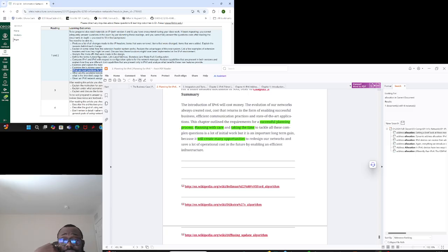Once you've done that, the next thing is that you have a high level overview of what nodes we have in IPv6. You need a pilot study. A pilot study is where you could leverage another company or another team who have already deployed IPv6 end to end. You want to get into contact with such people. You want to know about the lessons learned so that you do not repeat the same kind of mistakes in your environment. You also want to build a lab environment and then start playing around with IPv6. It helps a lot.